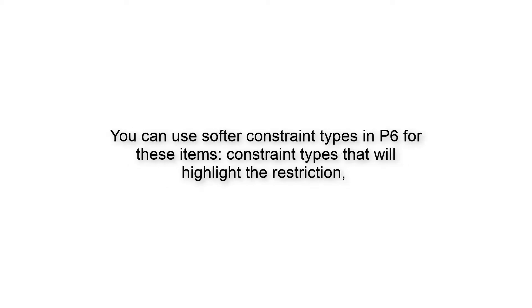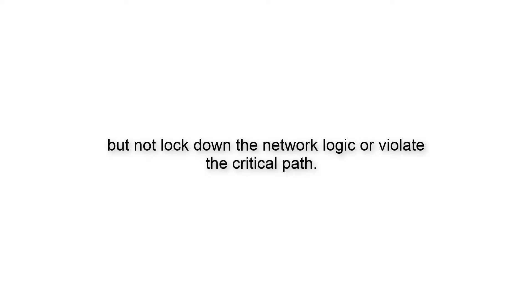You can use softer constraint types in P6 for these items — constraint types that will highlight the restriction but not lock down the network logic or violate the critical path.